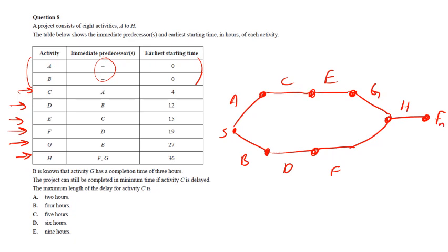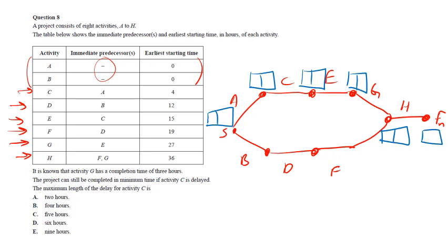Now, normally in these situations you have little boxes that you put at each node. I'm going to do it in a different color just to help with everything. So here are the boxes I put at each node here. It's going to get quite cramped, all this. There should be a box there as well. Box there, and a box there. All right, so we know that the earliest start time of everything is always going to be 0 in the left-hand box.